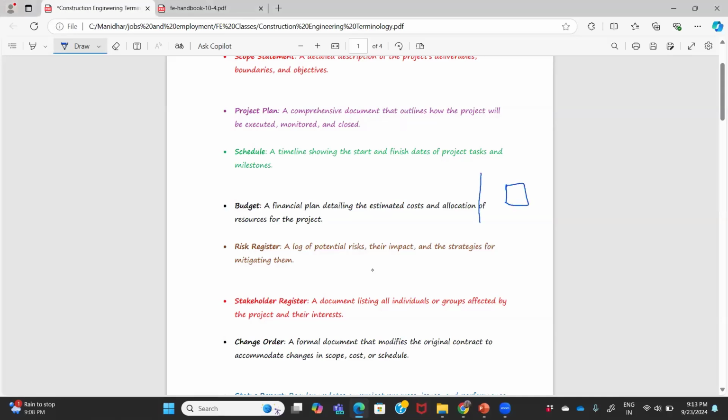Consider this line as a seashore and water is coming from this direction, whereas this is your project site. You decided to do the shoring here. Though you did the shoring here, there is surplus of water in your plot limit. Doing shoring is not good enough here. So what you do is you will do another line of shoring here. So the water has to pass two layers of shoring. But considering the initial risk, you just did the first layer. You know what I mean, right?